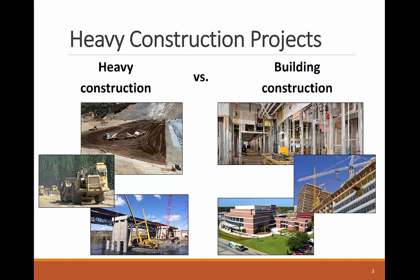Second, heavy and building contractors deal with different owners, which is why they are awarded projects using different project delivery systems. Heavy contractors on public projects need to submit formal bids and go through an open bidding process with the hope to be the lowest bidder and win the project. On the other hand, private owners of building projects are not tied to public laws and regulations, so commercial contractors and building owners negotiate their way to build the project.